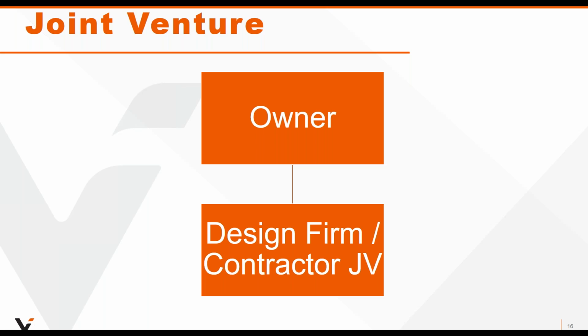So obviously, it's essential that, number one, you have an agreement that spells out exactly what the responsibility is between you all, and typically the way you structure it is that each party will be responsible for their own negligence, obviously. But beyond that, you need to be able to select somebody who can stand behind their obligations. And obviously, in a joint venture with construction responsibilities, if your joint venture partner can't meet their end of the bargain, then that could potentially leave you on the hook.